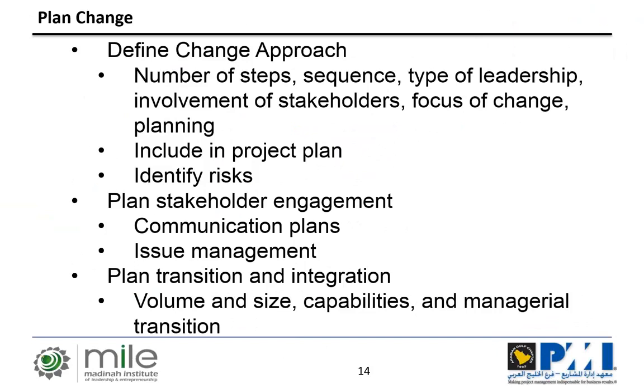Define the change approach. What it basically means is that you have to define how many steps you are going to take, the sequence, and the type of leadership that you're going to apply to your change. Is this going to be imposed, or a more collaborative approach? How involved are your stakeholders going to be? What is the focus of the change? Is it the people, the process, the organization? And then you start thinking about the different components of the plan.